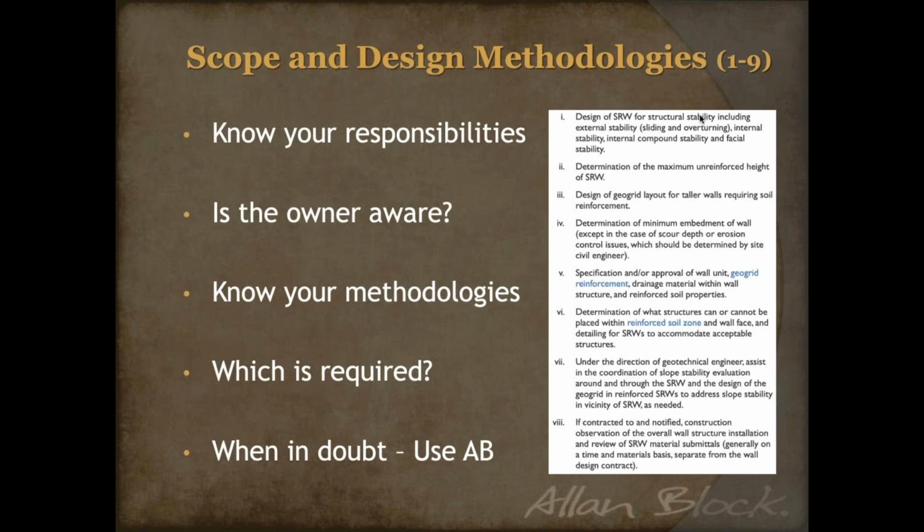Of course, you can help them if you're able to, but it'll avoid them potentially blaming you for things that aren't part of your scope. This is another reason why it's important to have site civils controlling the design here. Lots of them have experience with what falls into their roles. A good example of where you can go to look at suggested roles for engineers is the NCMA design manual. Their section 3 talks about some of the suggested engineer roles, and that's a great place to go through and look at what's suggested for you to do.